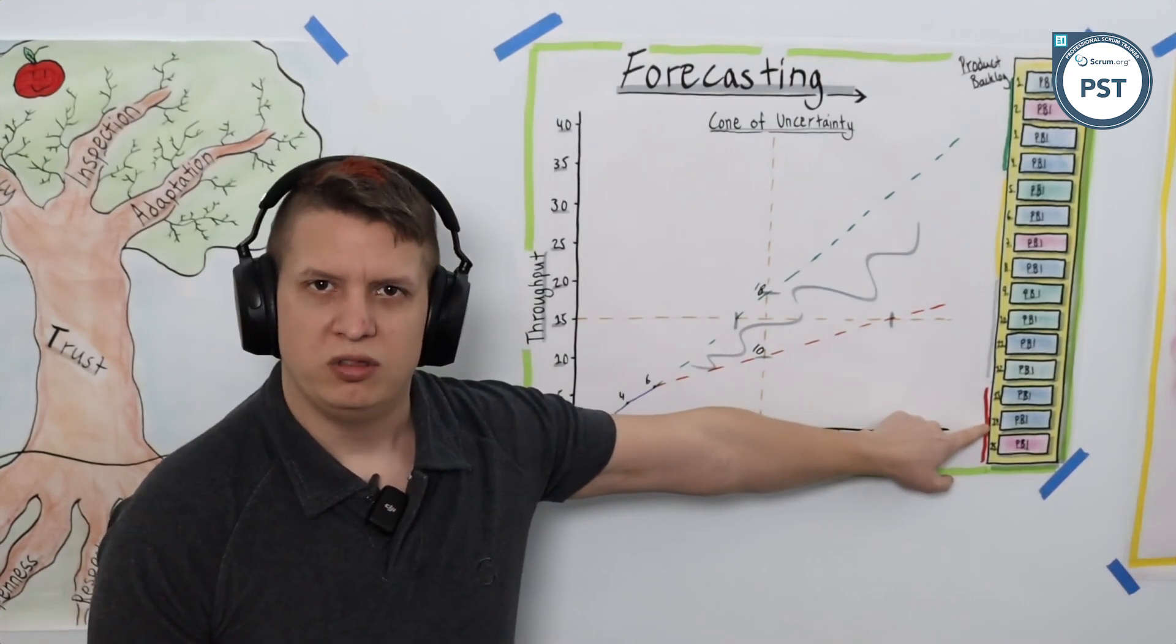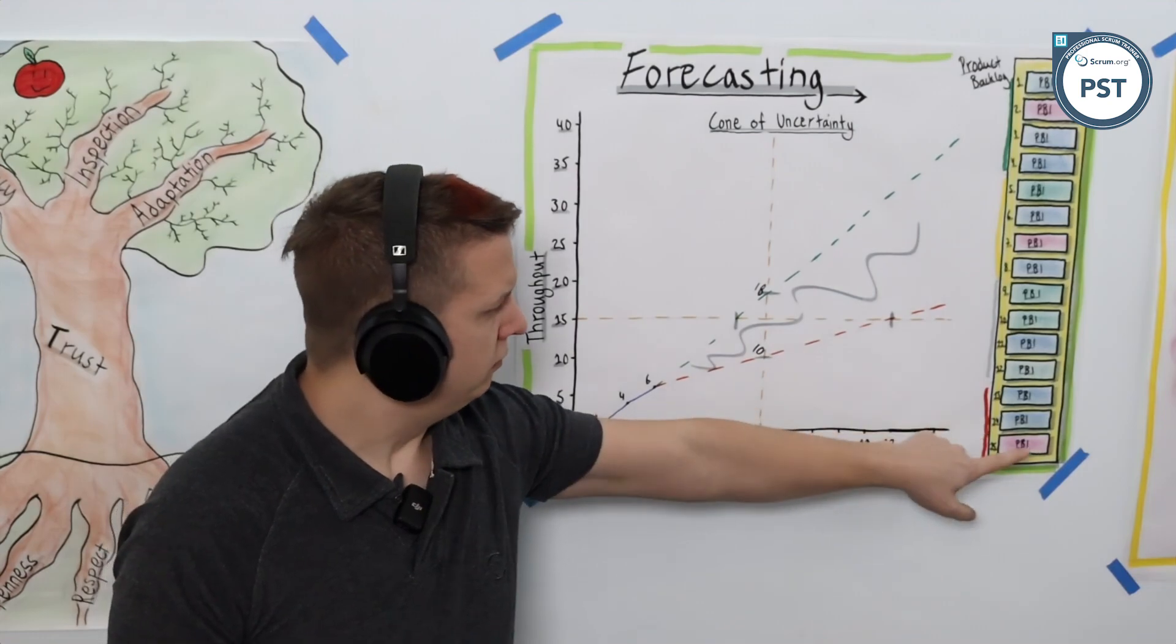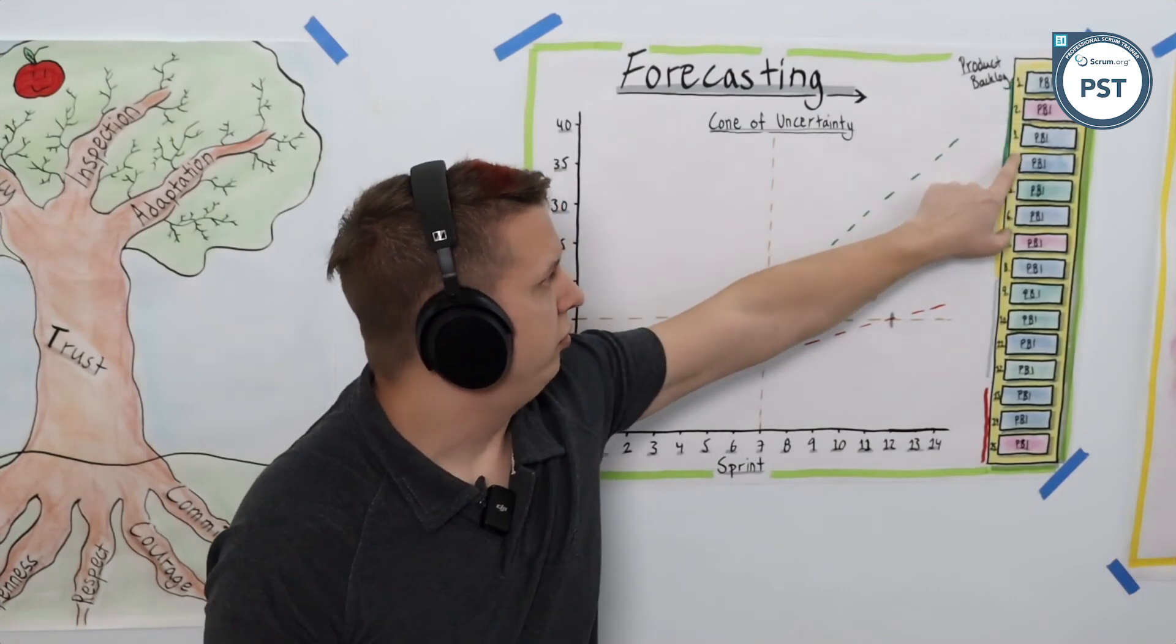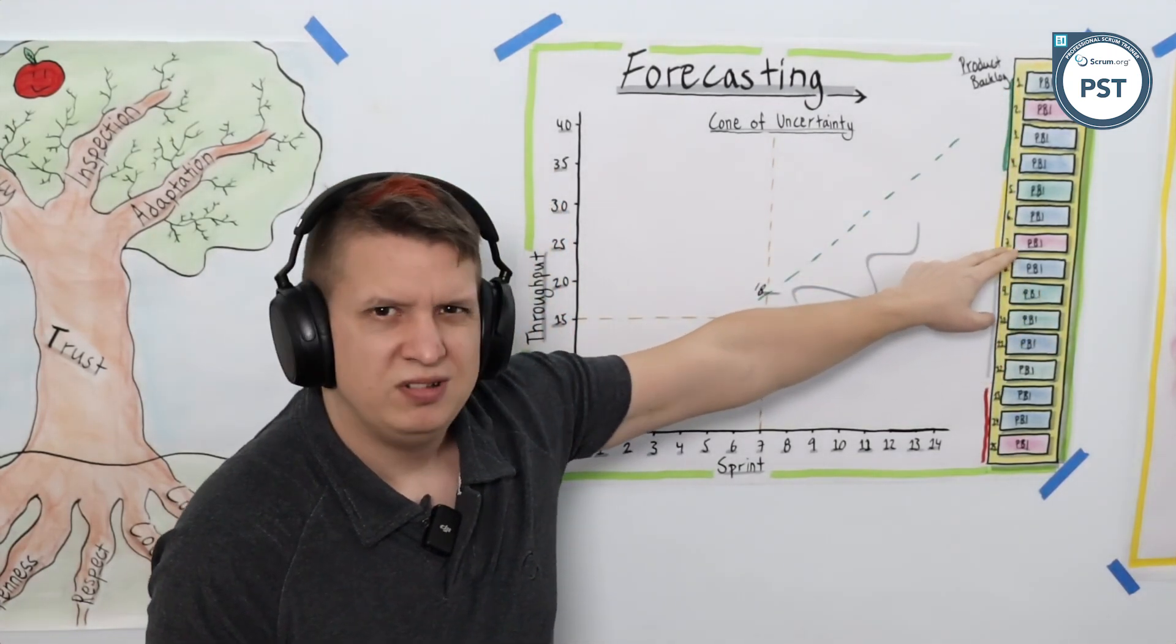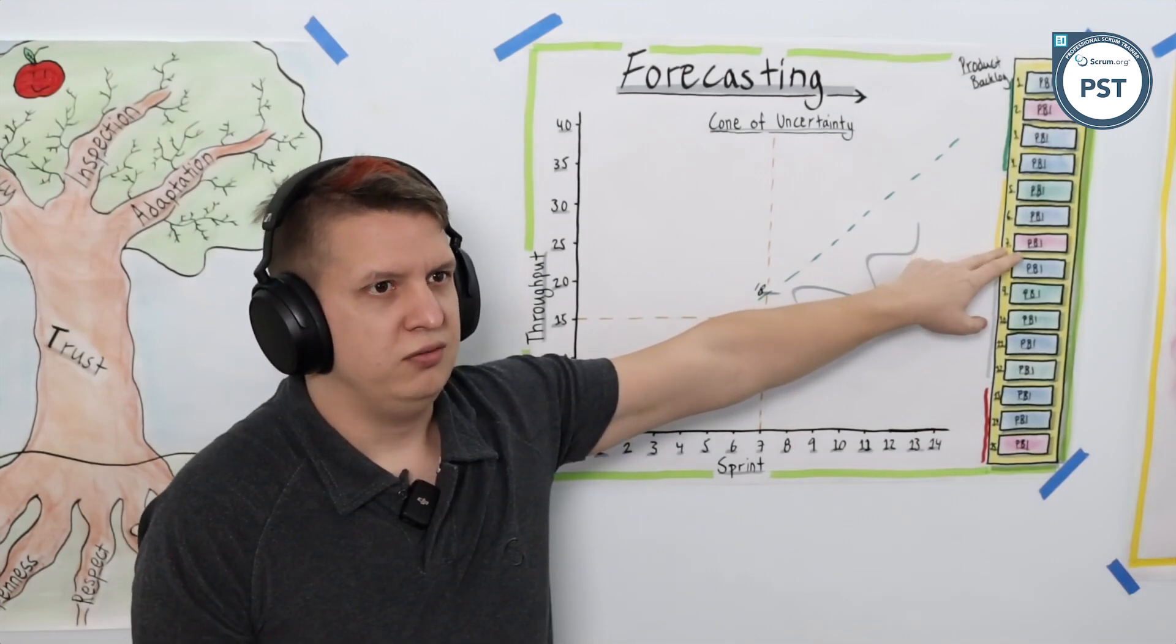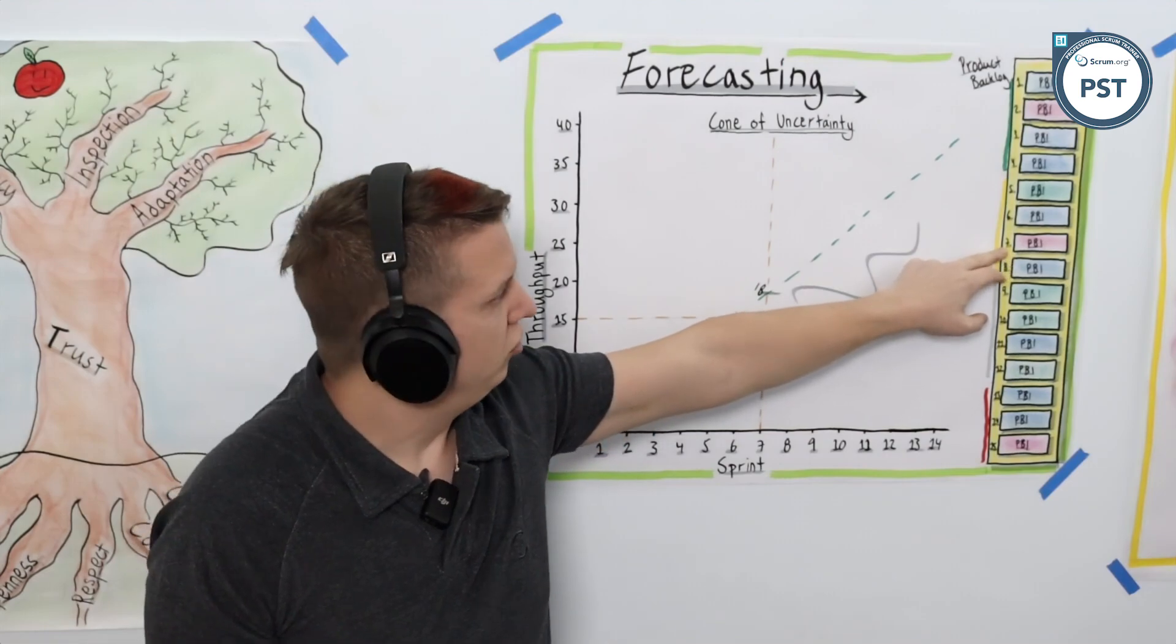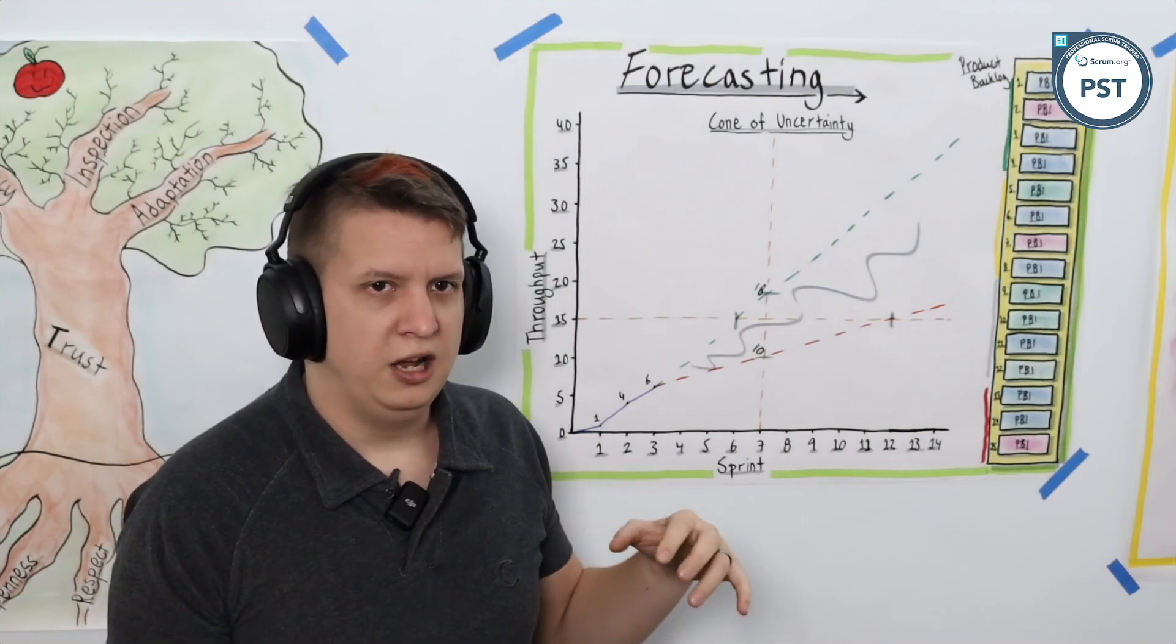If that means that by sprint 7, number 14 actually has to happen - we've got an expo happening where this would really be good to be able to showcase to potential clients or customers - we probably want to reorder the product backlog accordingly and move 14 up into the guaranteed one, two, three, four. Whereas maybe number seven, that one's not so time sensitive. Yeah, we want to get it done, it's valuable, but it can wait until after sprint seven, so let's move it down further in the product backlog.